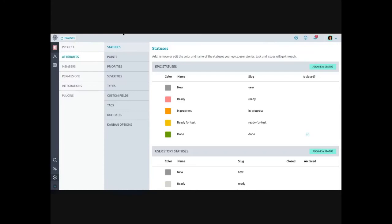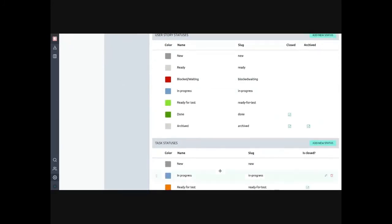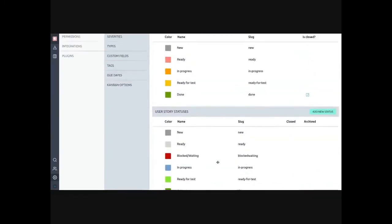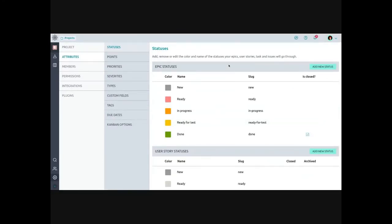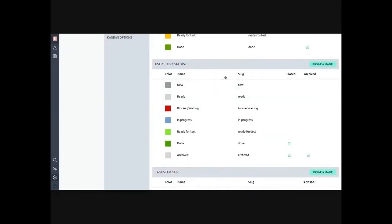The attributes section is where most of the interesting configuration happens. You can set statuses for your epics, user stories, tasks, and issues. The user story statuses are where you want to focus — making sure you have reasonable columns. For example, Fedora Magazine recently changed some of their columns because it was unclear what 'queued' meant versus 'scheduled' versus 'archived' — it felt like too many states. So they got rid of the archived one and combined three columns down to two to be clearer.